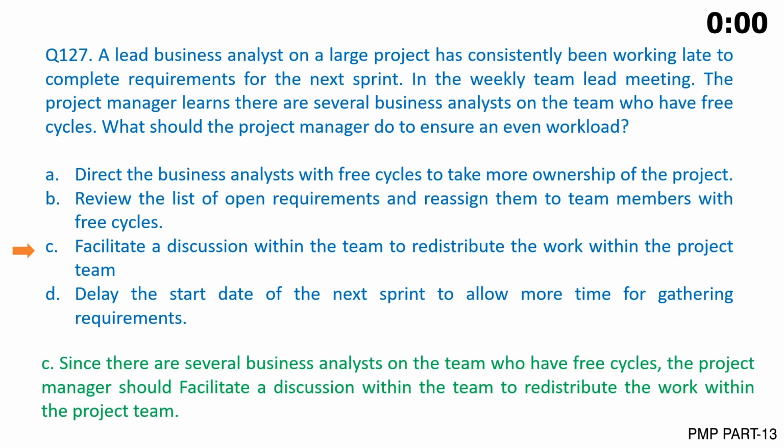The correct answer is C. Since there are several business analysts on the team who have free cycles, the project manager should facilitate a discussion within the team to redistribute the work within the project team.